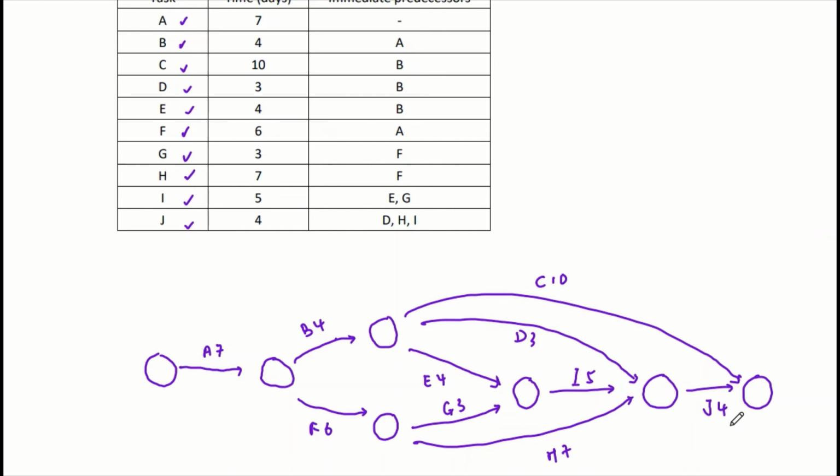So I hope that you can try to practice it. After doing it a few times, it should be quite easy for you. So the idea here is, remember, you don't draw the braces together with your edges. You draw vertices, then after that edges. Every time after you indicate one task, you just stop at the edges here. Only when you know what the next step for your task is, then you put down the checkpoint. All right, so that's the part for constructing the network.